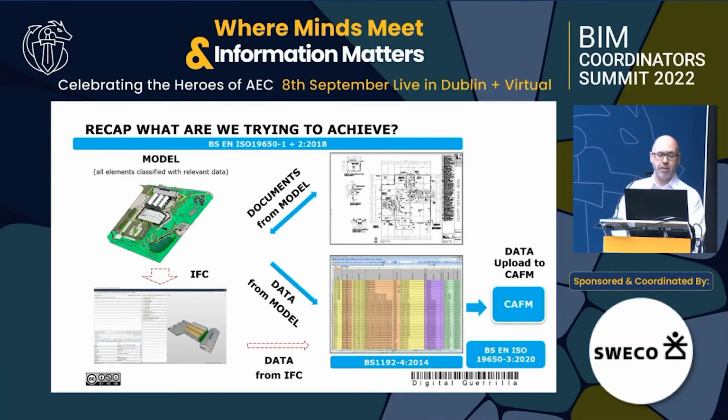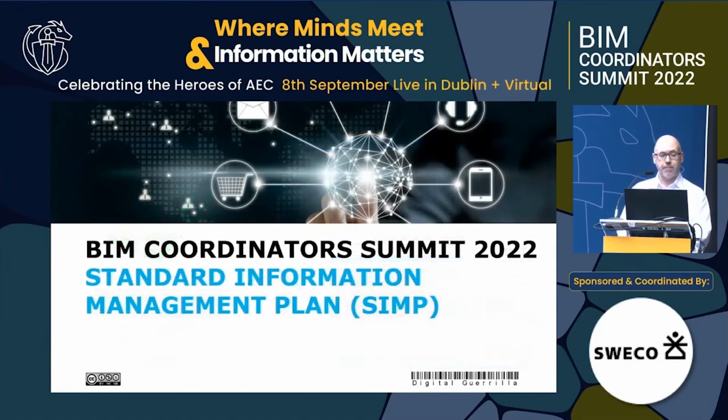So we're making sure everyone's building their models correctly, all your documents are linked to the models, and all the data is exported using COBie. This can also be done through IFC and open standards. And then finally, it's all uploaded to the CAFM system at the end, following ISO Part 1, Part 2, and then finally Part 3 methodologies.